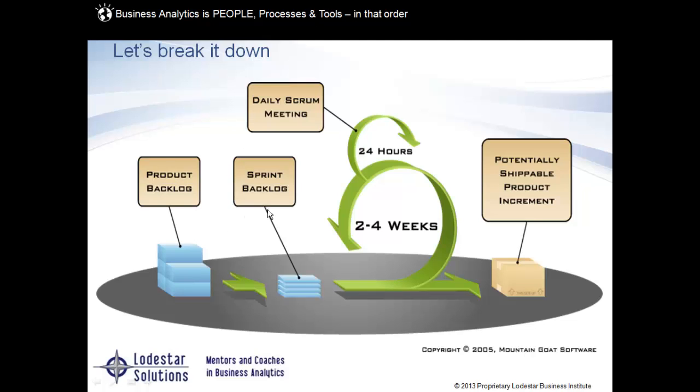I break that down into what's called a sprint backlog. This is like a task list. It changes every 2 weeks. Every sprint, I have a new list. This is a small chunk of what we're developing here. This might only be one little block, and we're breaking it down into these different tasks.